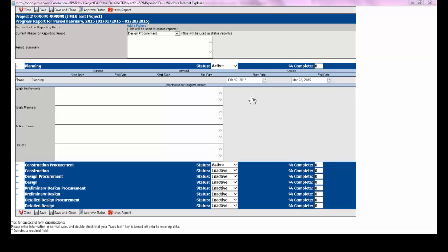There should only be one active phase at a time. All other phases are either complete, inactive, or on rare occasions on hold. There should only be one phase, which is the active one, that has a percentage other than 0%, as in inactive, or 100%, as in complete.